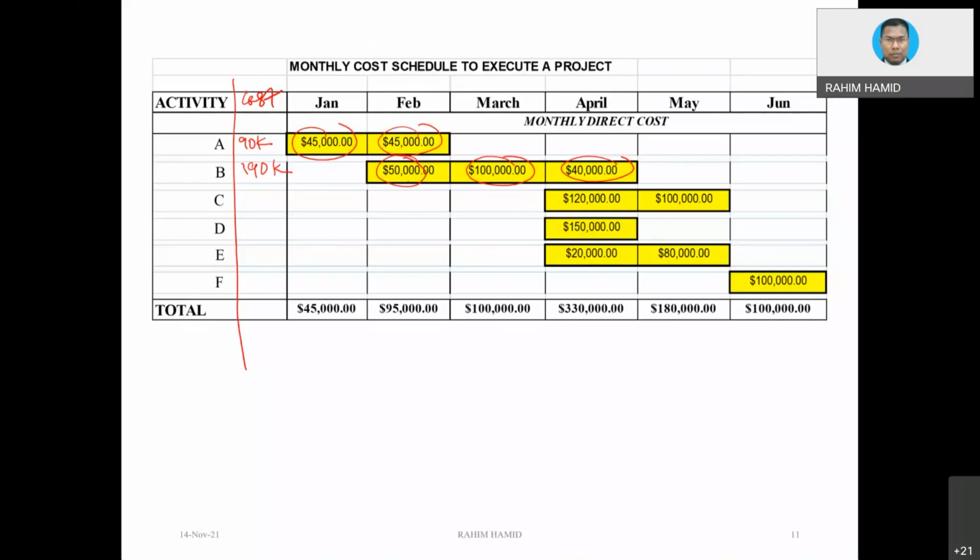So maybe the distribution of the cost might not be what we call normal parabolic, maybe because at the beginning you have to spend a lot more because you need to purchase all kinds of things, material, which is basically already fabricated, but then you just simply install. The installation part is just very quick. But for normal construction, this could be the scenario.